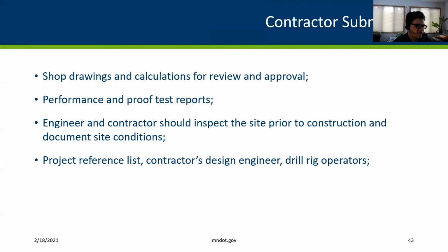Should take a look at those, whether that be internal or some other hired consultant. And then they're going to be performing performance and proof tests on these nails. They're going to have that in a report that needs to be documented. So that's something we would expect to see for this type of wall.